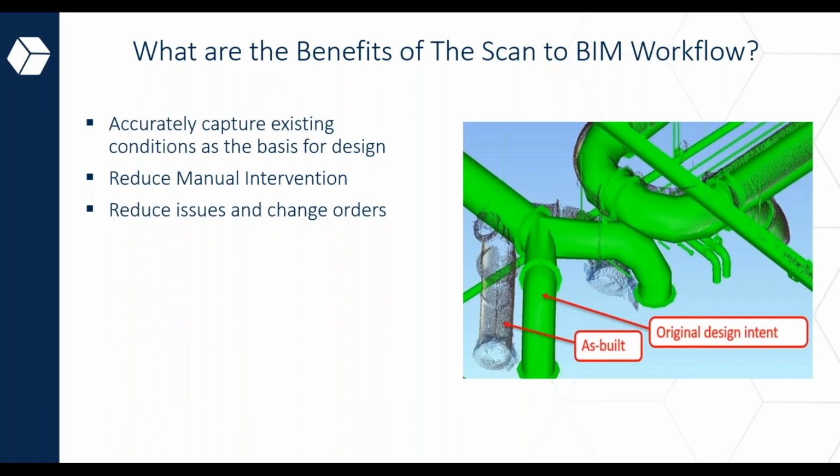Another benefit is that the scan to BIM workflow accurately captures your built environment and it helps you identify potential issues and clashes early on in the design stage. So by visualizing the existing conditions and proposed designs in a digital environment, stakeholders can detect and resolve conflicts much more easily. We can detect a clash, convey that information to the relevant disciplines, and basically this would lead to a smoother project execution and minimize disruptions and delays.